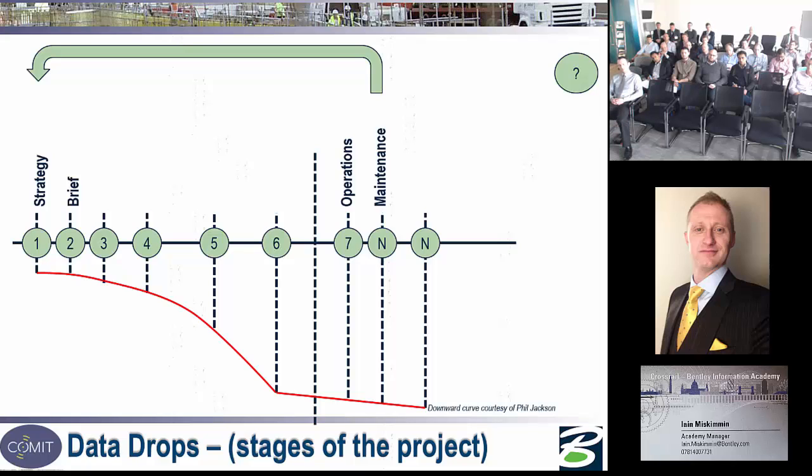So that's what I will explain a little bit furthermore later on, is COBie. So I'll hand you a file that contains all the asset information of what I've already got. And it will contain all the drawings, all the documents, all the other things that they already know, perhaps a laser scan, point cloud survey, whatever it might be. But that's the brief. That's me, the client, telling you, the contractor, this is what I want and this is what I already have.